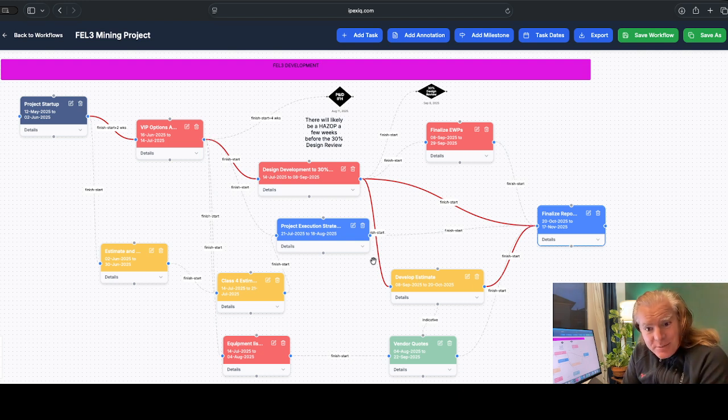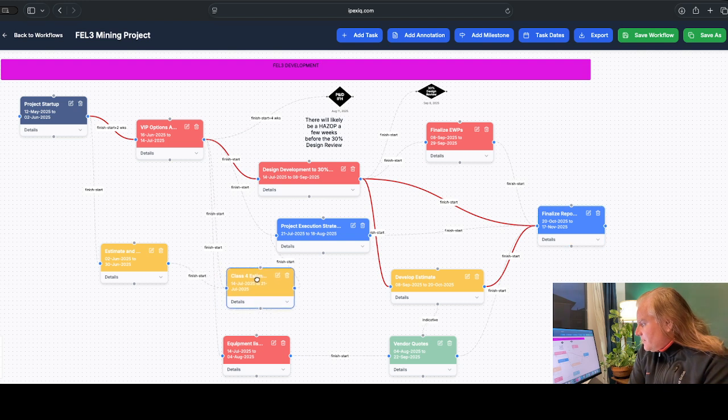And what's really interesting about that is that sometimes people show activities as being critical, and what's actually causing the criticality is your logic between the activities. It's like the arrow node thing that we talk about a lot, but this is me putting it into a logic block diagram and highlighting the criticality through the logic relationships. And you can trace where the activities are that are linked in, and those are obviously the critical activities. Just a nice little view.